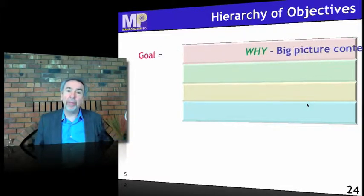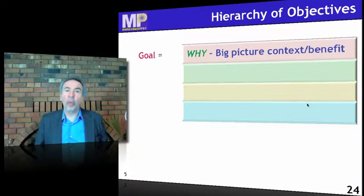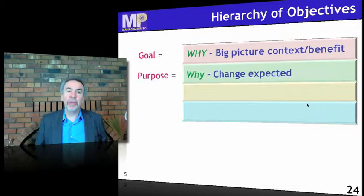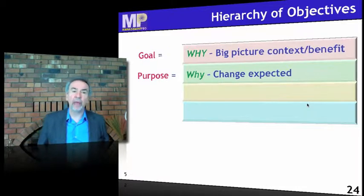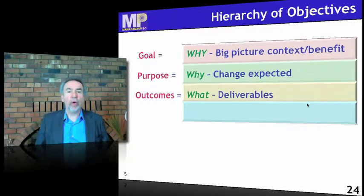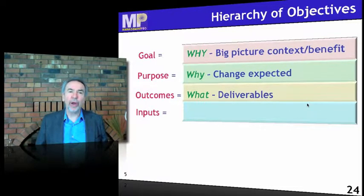Goal: the big picture, the why we're doing this, the context, the benefit. Purpose: a lower-level objective that talks about the change expected after you've done the project. Outcomes: what specifically we can deliver or make happen. Inputs are the tasks and resources to get there.